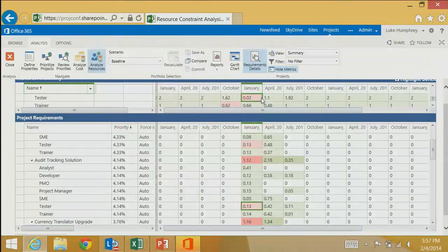All right. So one thing you can do is what we call sequencing of projects. If you look, there is more availability in the remaining part of the year. So you can move it out, assuming your business is okay with it. The requesting group says, yes, you can move it, I don't have a hard deadline to get this done. So I'm going to change this date to the next quarter, the third quarter of the year.